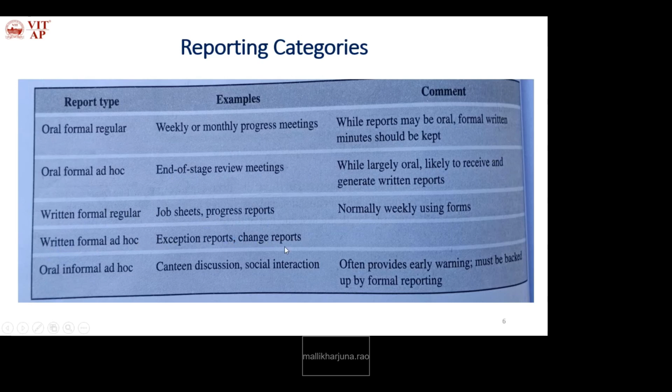So during development, definitely the client will suggest some changes, depending on the market trend. Okay. We have to accommodate the changes. So when the project has started and a change is suggested, we have to maintain a record of the changes. Okay. So that is next.